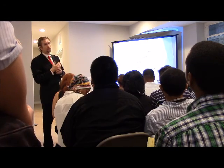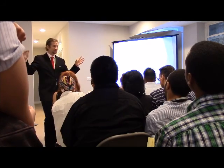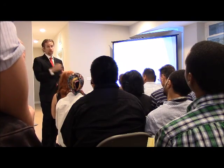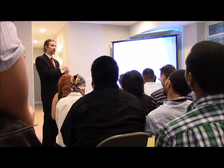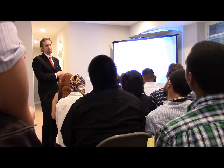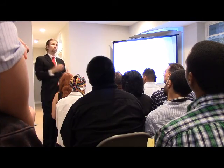There are different demo forms that you need to file with the city of Chicago. You need to have a special kind of survey too. When you do new construction, you also need to have the setbacks of the homes next to you. So we ordered the survey, you can even order it way before this, but it also needs to be submitted. And you need the setbacks of the homes, 2 on each side of your project.